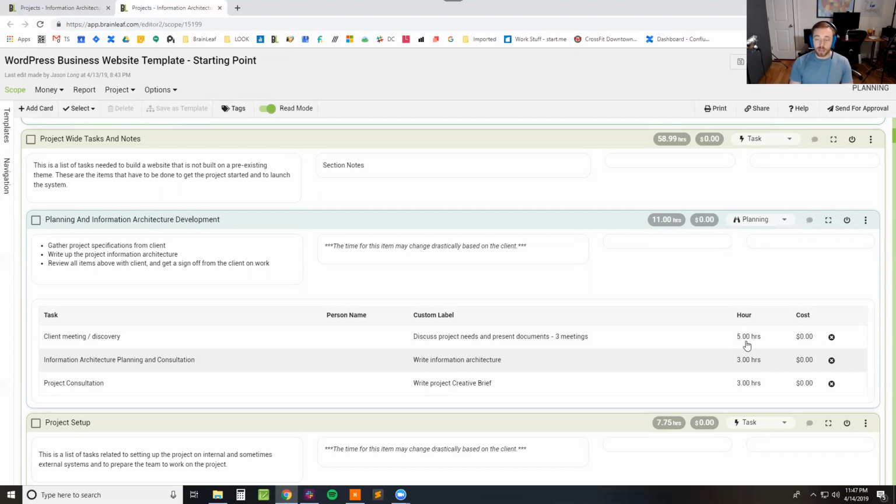I've got it blocked at 5 hours. It could be as little as 3. It could be as much as 10, even for a small site. But it's never going to be less than 3. So don't ever put less than 3 hours in for that.